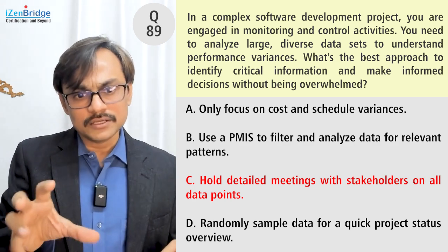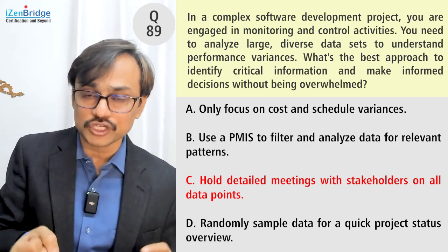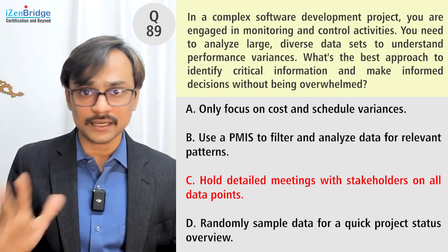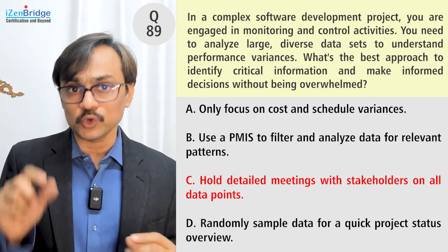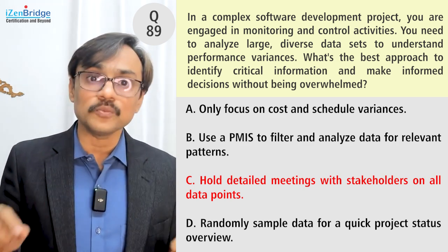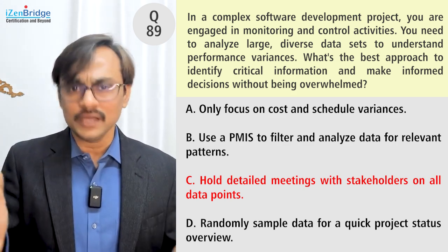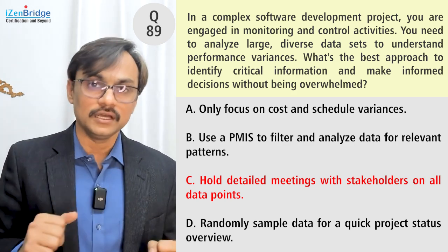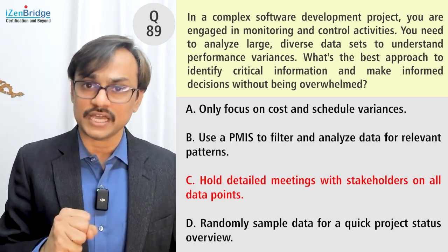I may have a small subset of the group, so maybe a selective set of stakeholders who can help me in analyzing that data. I can do a meeting with them, but holding meetings with the stakeholders without qualifying them, and putting in all data points, is a little risky here. I will definitely use a tool, and then probably go with a detailed meeting with a few stakeholders on the trends and analysis which I have done.